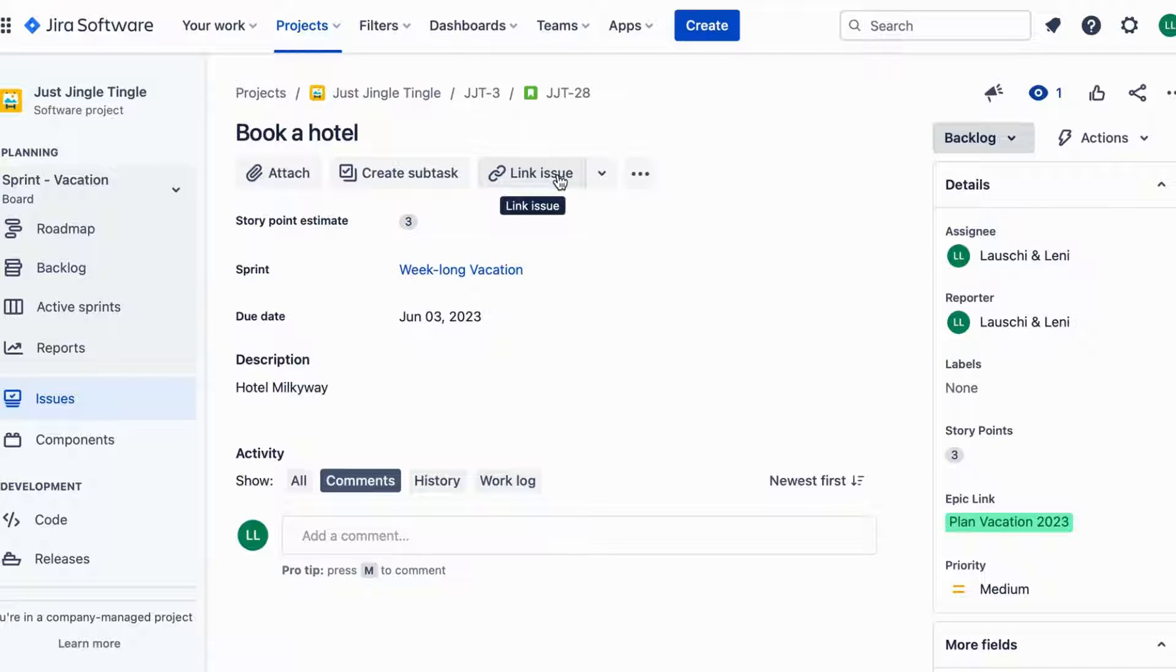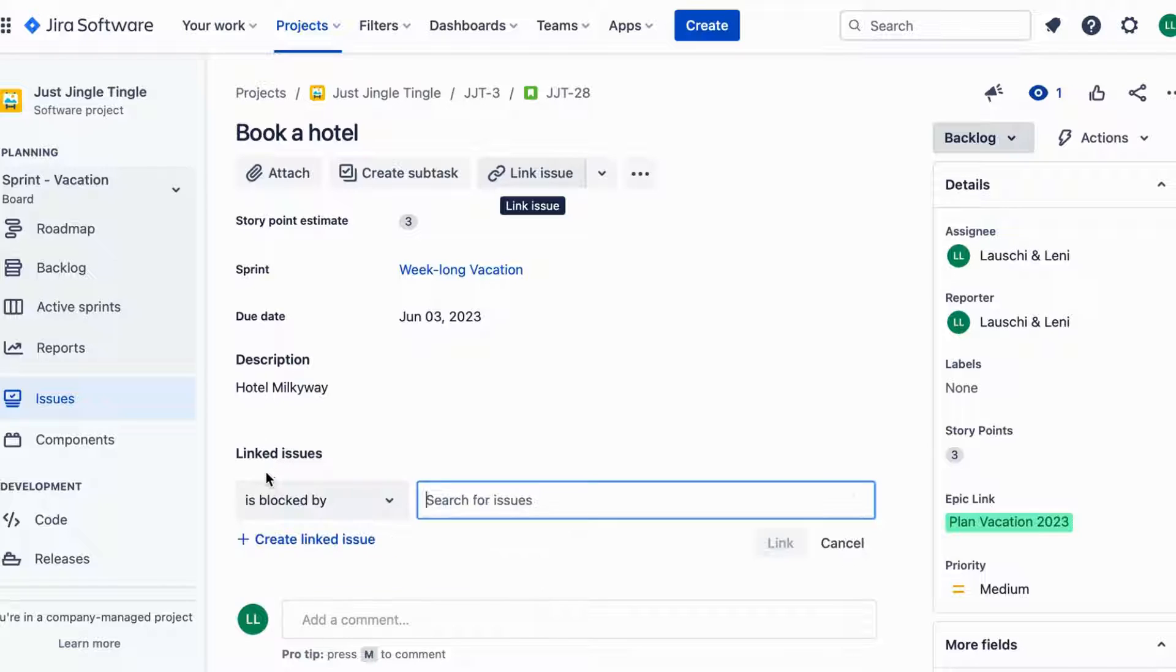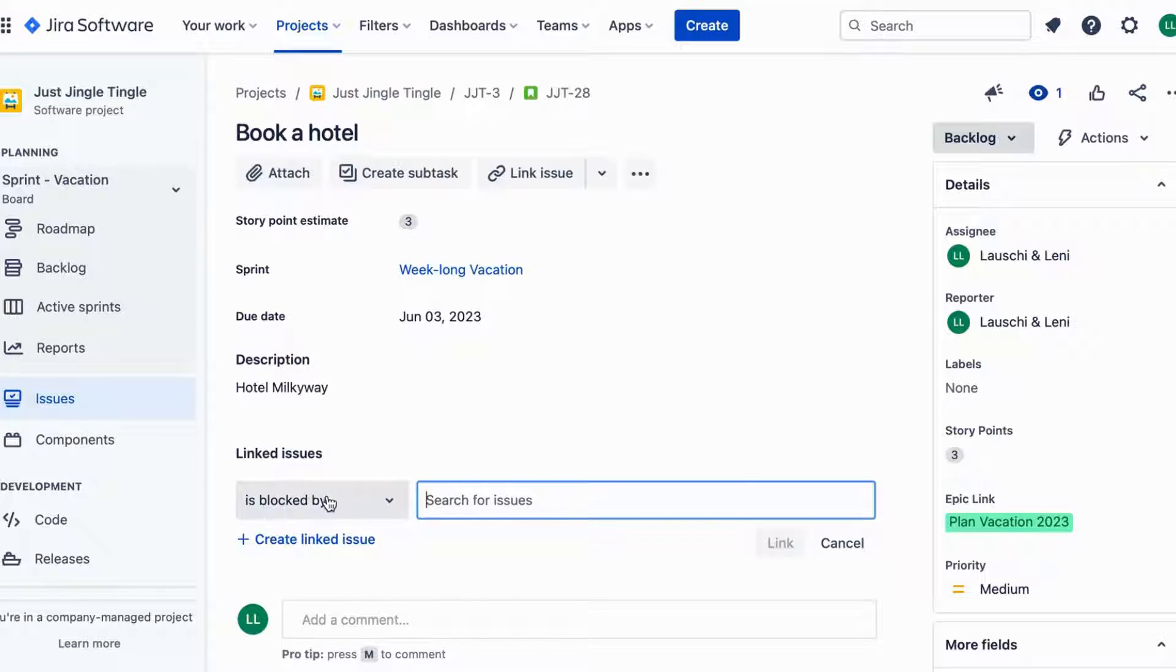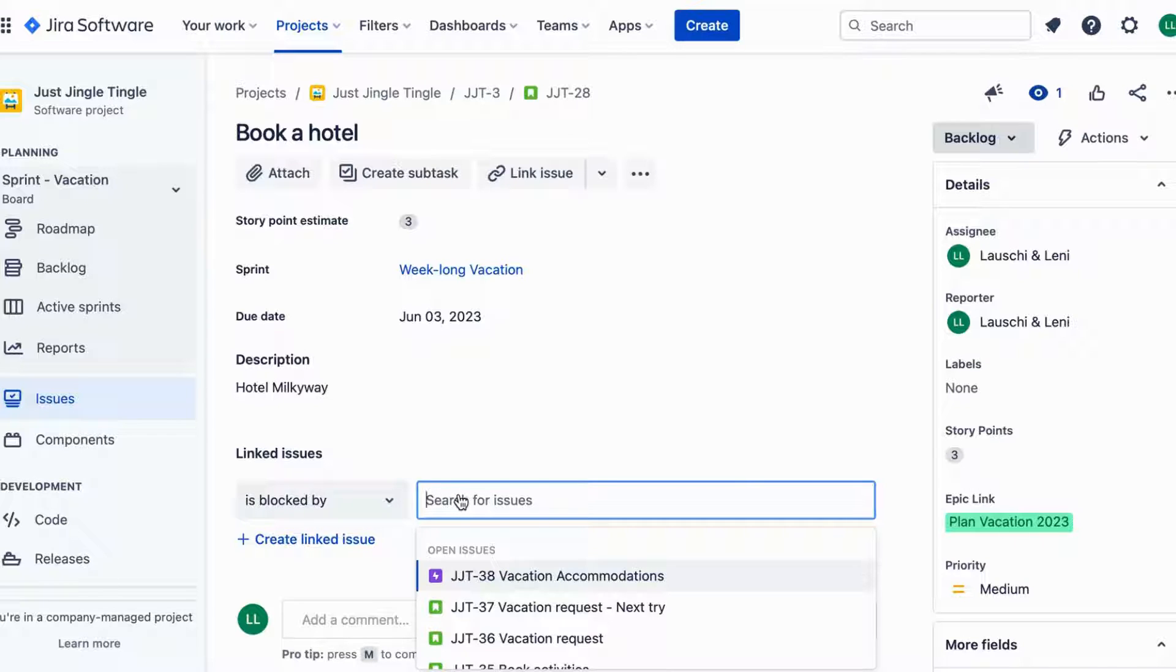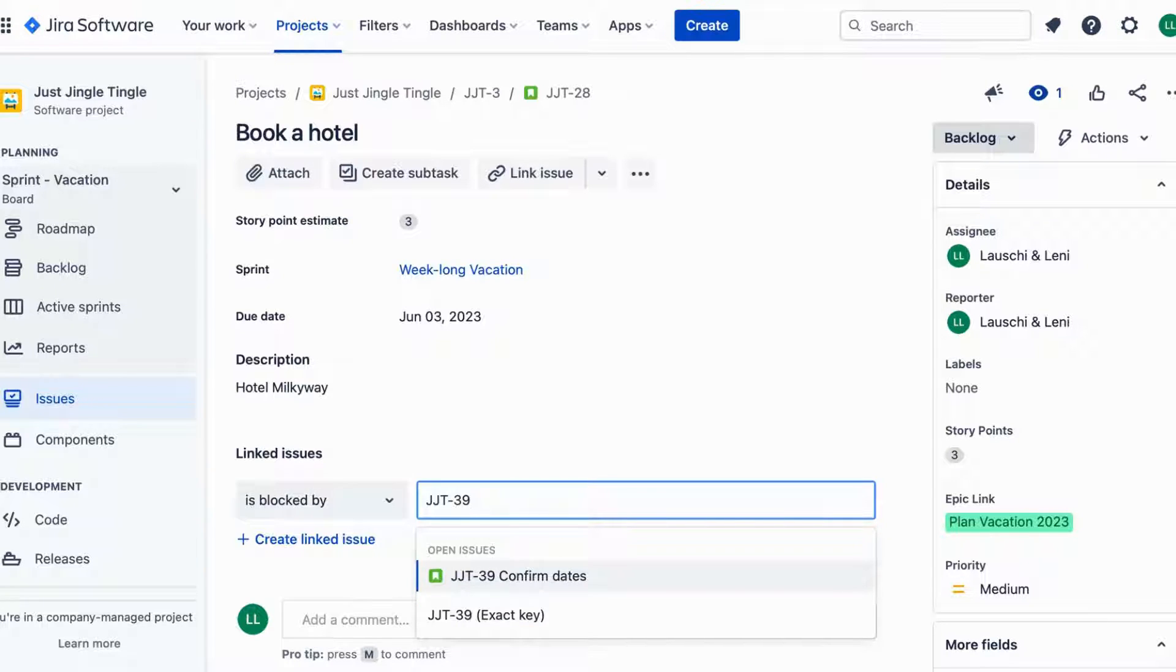In Jira, blocking an issue means you can't progress with that issue until the blocking issue is resolved. For instance, the issue you created for booking the hotel is blocked by the issue of confirming the dates and you can't move forward with the hotel booking until the dates are confirmed.